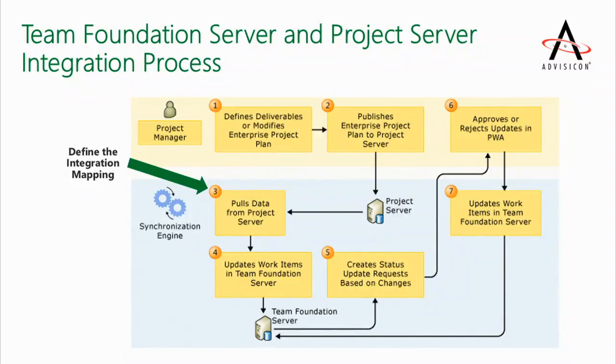What's important here, and I've called this out on the left-hand side, is that you definitely want to do some integration mapping. The reason for this is that if you have custom fields or story points, or things that you want to marry or map between the two, iteration is another term for sprint. If I want to begin syncing these pieces together, we need to map the two places and say, all right, these two databases, here's how they're going to sync. So what we want to do is sync those two together.